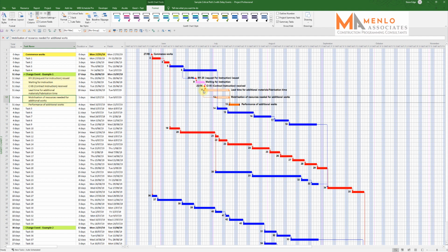So they are part of the story. You knit them into the story, and these things have to arrive on site before you can actually carry out the works. So the work itself in this instance is only 4 days work, but it's taken 13 days from when you discovered the problem to the point where you can actually repair the work. Now, as you can see, the original excavation work has been able to carry on. The impact comes to this task, because this is the task following the excavation work, and obviously now this task has to follow this work as well.